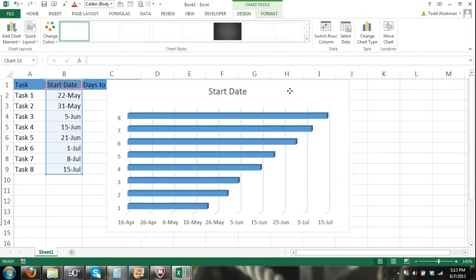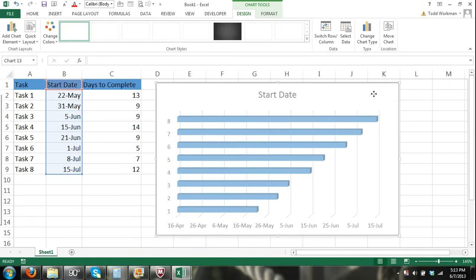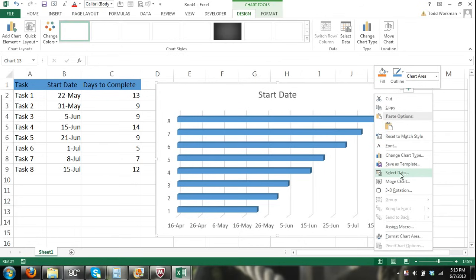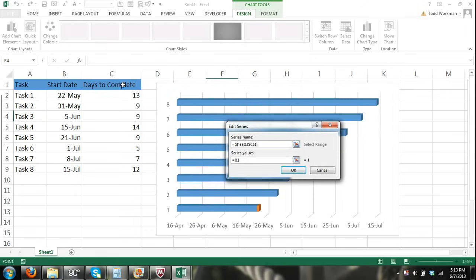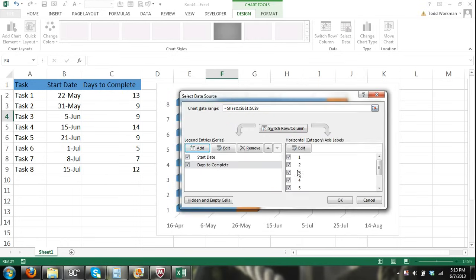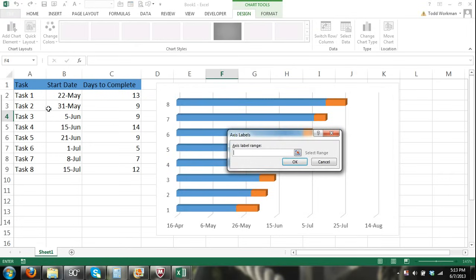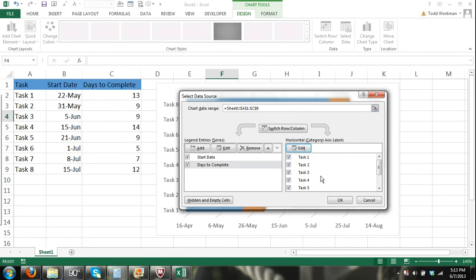Move the chart and dialog out of the way, then right-click a blank area of the chart and select Select Data again. Now click Add to add a new series — for series name select Days to Complete, and in series values select the range of cells with our days-to-complete data. Click OK. Back in the Select Data Source dialog, click the Edit button under Horizontal Axis Labels and select task one through task eight, then click OK and close the dialog.